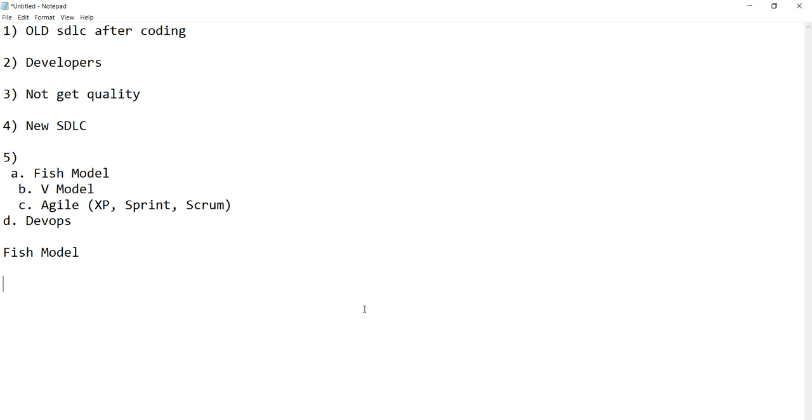Like at first, the project manager initiates the project initiation note, which will be given to the CEO, then the CEO will give the go-ahead to begin. Once the BA can prepare the BRS and review the BRS for completeness and correctness, then business requirement specifications or user requirements are collected specifications.